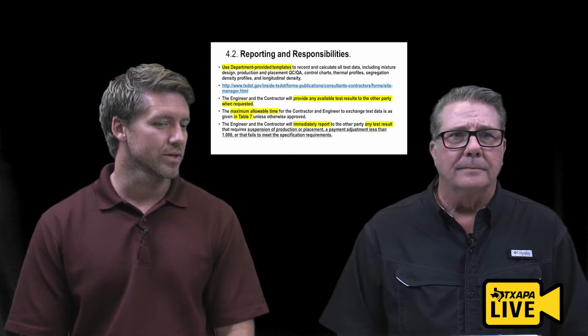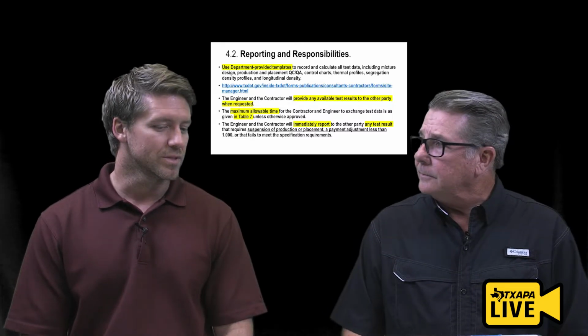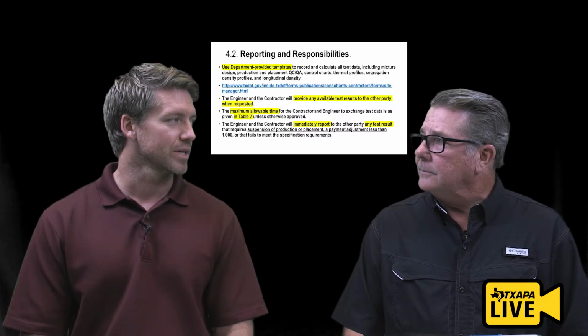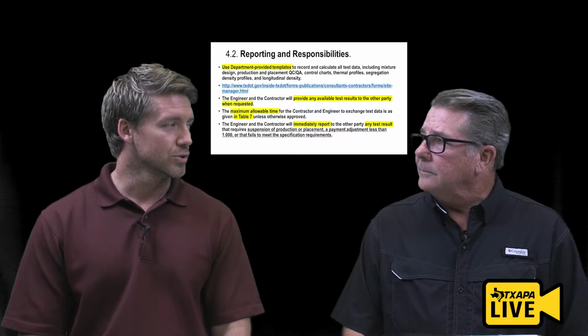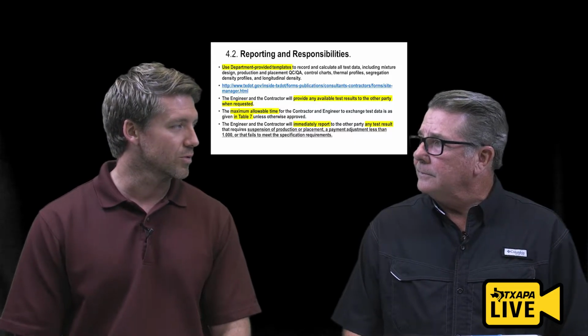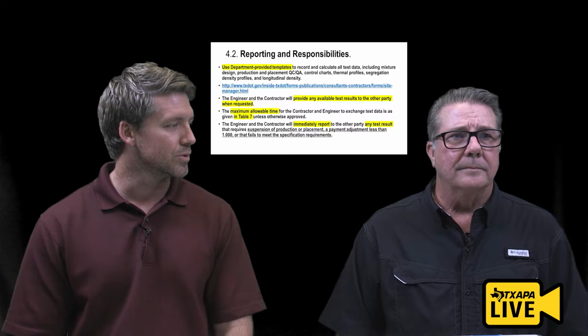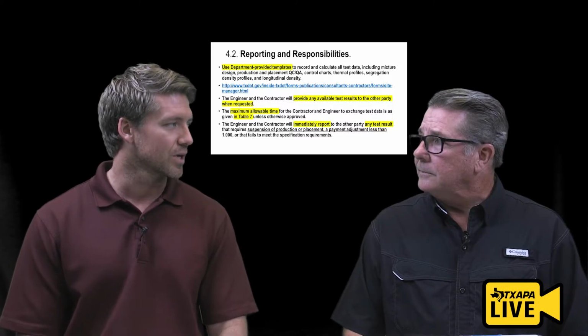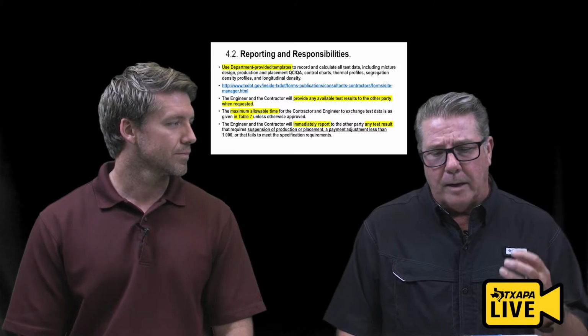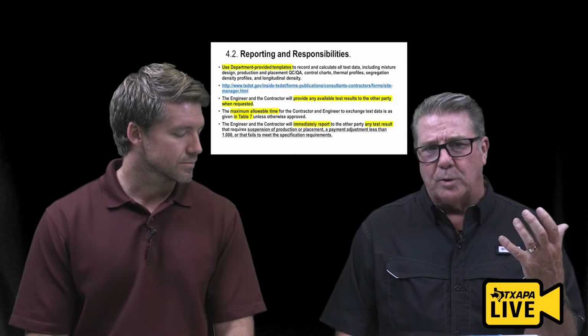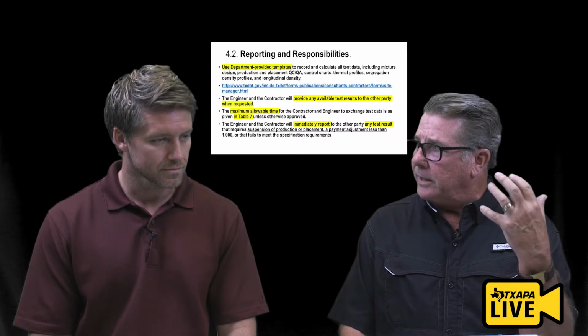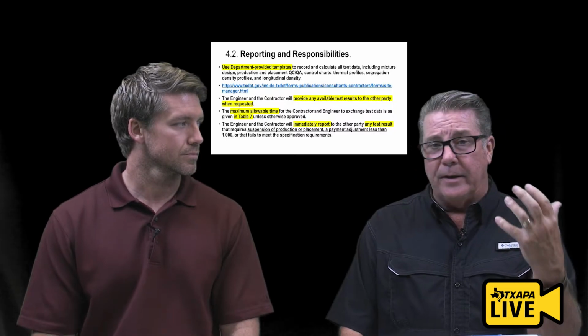But for the district, when they're building out their project, MTD actually assigns all of the sampling and testing requirements. So when they go to that physical project, it'll populate the forms that they need. So they should be able to pull the brand new forms directly from their project file. So, when you say these forms, the forms are where you're collecting the data, you're putting the data into these forms, and then the results.